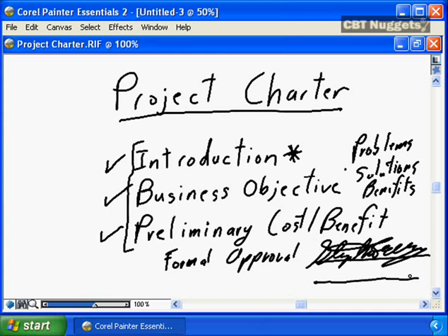So I think it's important in a project charter that the authors sign their name that says, we believe in this document, we support this document by affixing our signature to this document. I, business sponsor, agree that this is a valid, realistic plan, I'm putting my signature to it, and then there need to be additional signature lines for senior management.